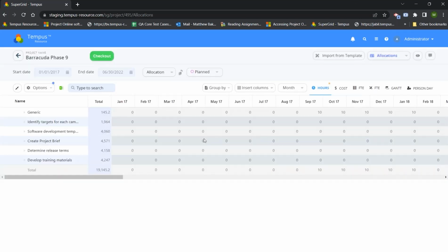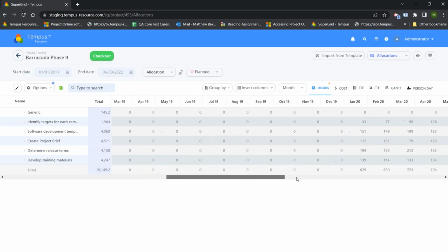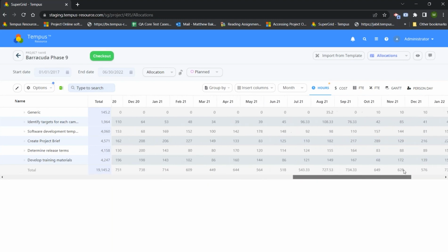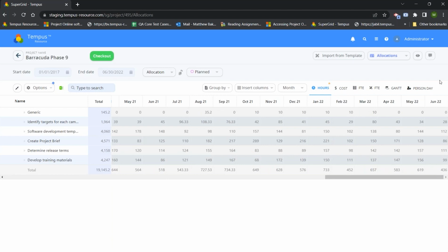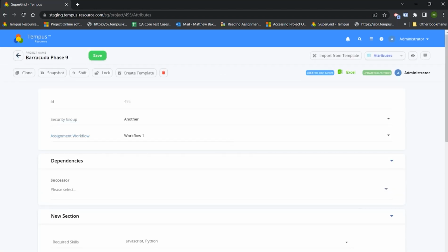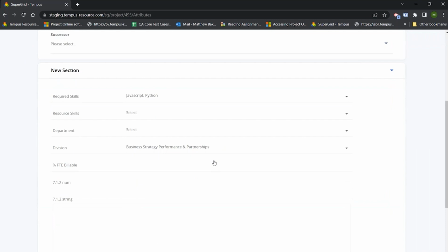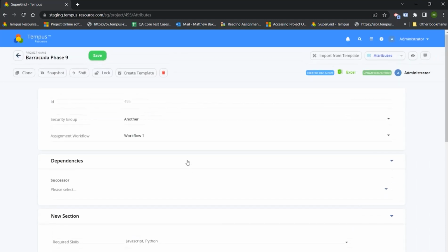And so now if I go to my allocation side of things, we should see that updated to be what it previously was. I know, for example, the date of the project may have changed, or any of the allocations, some of the attribution that I've recently updated essentially will change, and we don't have that information anymore. So it's essentially going to copy what you have within that snapshot and overwrite it into the existing project. So very nice capability, a way to essentially reconcile information that needs to be overturned and rolled back based off of any of these snapshots that you have within your system.